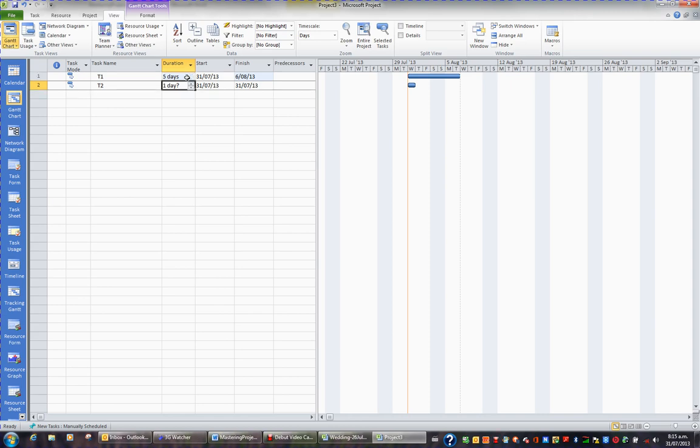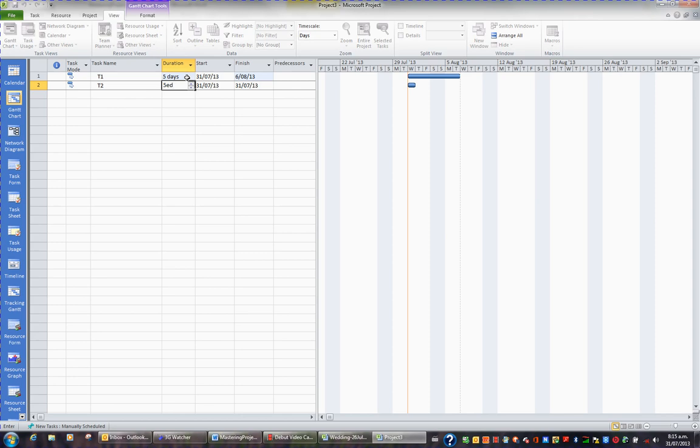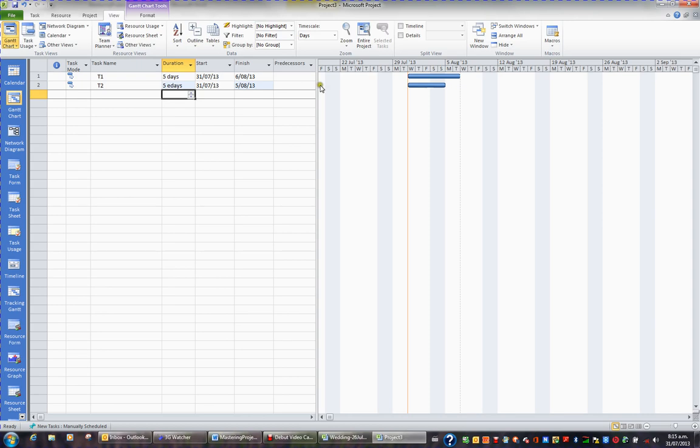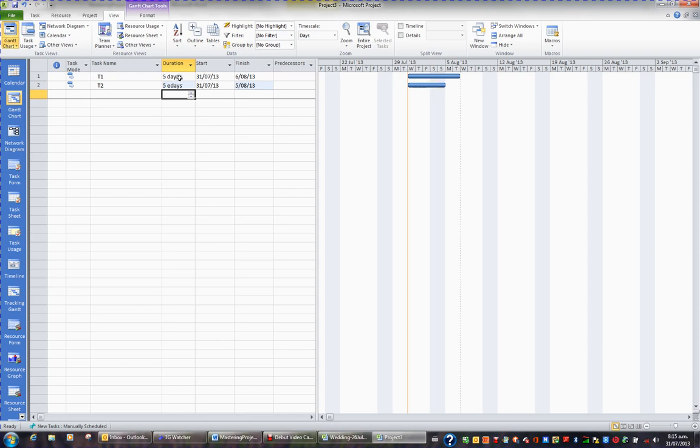But if I turn around and for task 2 put 5ED, E means elapsed. What that means is it ignores the project calendar. It ignores the fact that we don't work Saturday and Sunday, and this is reflected in the bar. By putting an E, I'm asking this task to work 24-7. So this task is going to be Wednesday, Thursday, Friday, Saturday and Sunday. This assumes we're working Saturday and Sunday. This one is abiding by the project calendar, and we don't work Saturday and Sunday, so it's seven days long.